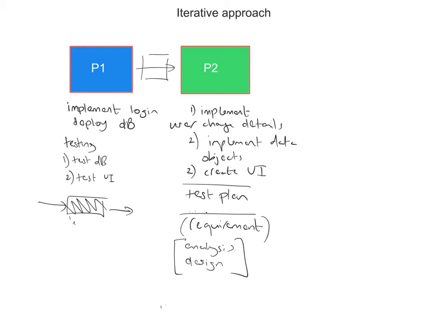It's a much better idea to capture as much of your requirements early on as possible because there isn't that much time to keep on cycling around this. But you should do that, and there is no issue to do that. I'm not recommending a really linear kind of waterfall model where everything has to be specified up front. There is some room for you to also iterate back over the project from the requirements and to do the design. But what I do recommend is that when you do discover these things, you make sure that you apply good managed process by looking at them properly and then feeding back into the design.